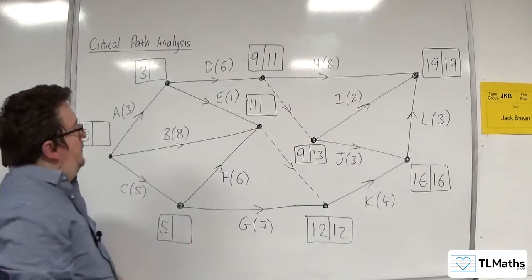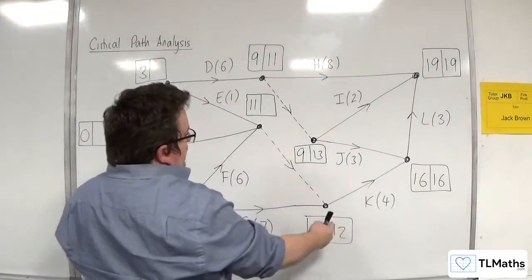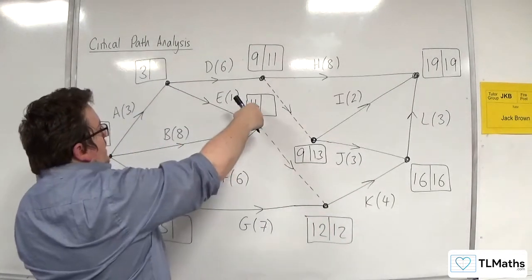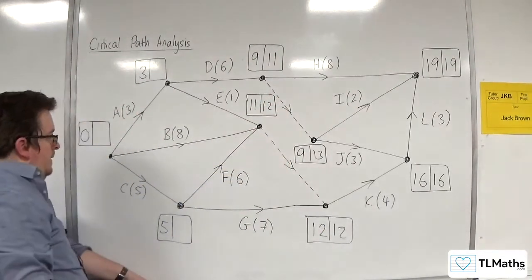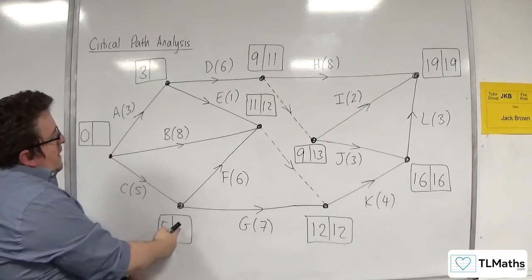So 12, now there's only one route back to E, so 12 take away 0 is 12.